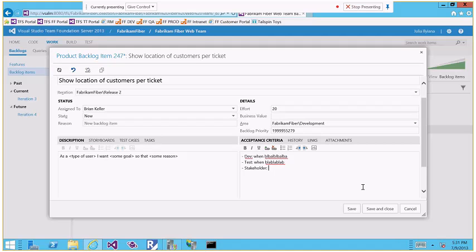This sometimes is called the user acceptance testing. Okay, the user acceptance testing. And so everyone in the team, the designers, the testers, everyone has to write here the acceptance criteria. So when you finish this product backlog item, you will review as a product manager or project manager that all these items in the acceptance criteria are done. And if they are done, it means that this product backlog item is done, is finished, and is an increment that you can deliver to the customer.